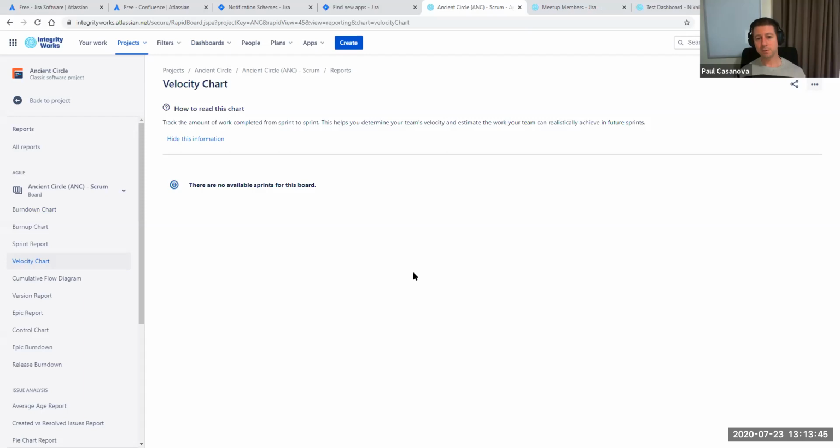our rolling average for velocity, and even what we'd forecast. Exactly. I think so. Even if I complete this current sprint, it's going to show me some kind of velocity. It'll probably say not enough data, so we need 3 sprints.